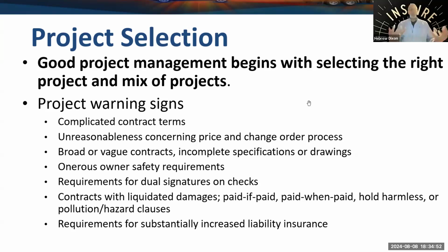And sometimes there's transitional things that happen, meaning information may get lost or may not get lost. So, going back to issues of exposure from a lawsuit perspective, make sure you have very, very thorough estimating files. Make sure you have all your costs in the file, and whether you're that same person or not, make sure you do a handoff between whomever put the number together and whoever has to implement the project execution strategies.